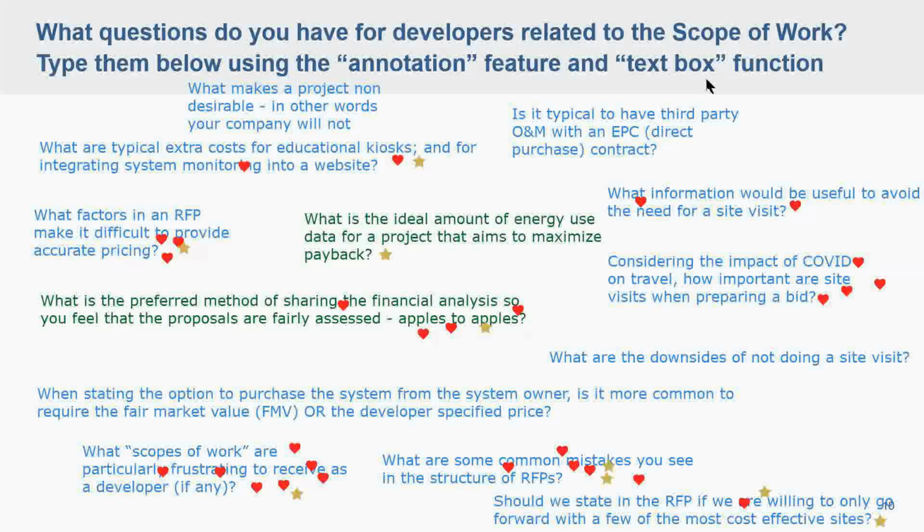Yeah, we absolutely spend a ton of time trying to levelize proposals. So it's something that's taken years to keep making better and better. And so I think the initial RFP, how you structure it, we always try and make that preempt levelization, but then we'll often get back bids and end up iterating an additional time and asking for updated bids based on changing key parameters.